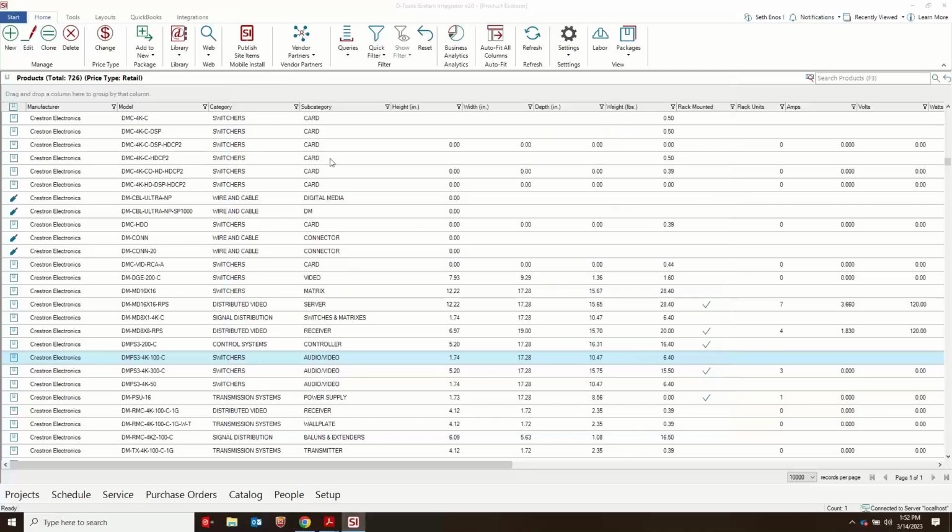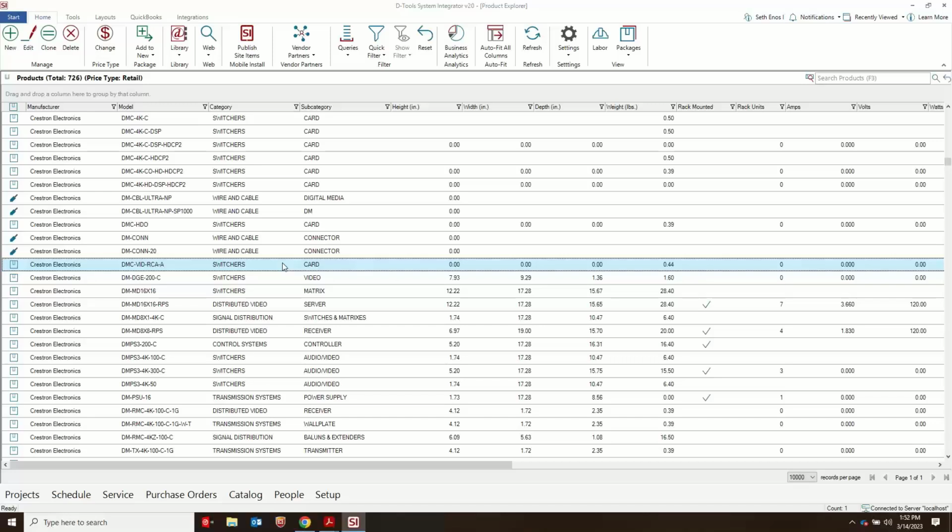So that's one consideration. The other consideration also has to do with estimated hours on tasks. Mind you, I'm certain you care about estimated hours on projects. Whether you care about them on tasks is split with our users. I think a lot of them lean towards not needing that, but some of you are very granular and like the estimated hours. It helps you during scheduling. When going to multiple labor types, you have to tell us which of those hours for those labor types you want added to the task for that product. And so that's just a consideration.